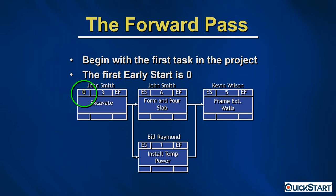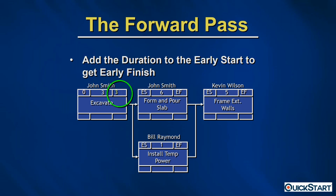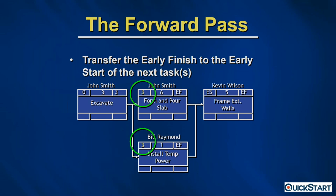To execute the forward pass, we begin with the first task — Excavate — and input a zero for early start. We then add the duration to the early start to get the early finish: zero plus three equals three. Next, we transfer that early finish value of three to the early start of the next tasks in the logical sequence. Those big green circles show we're transferring the three from the predecessor into the next two tasks.